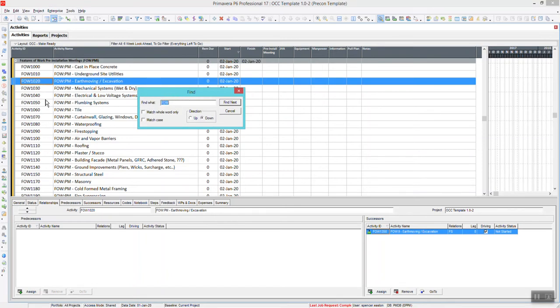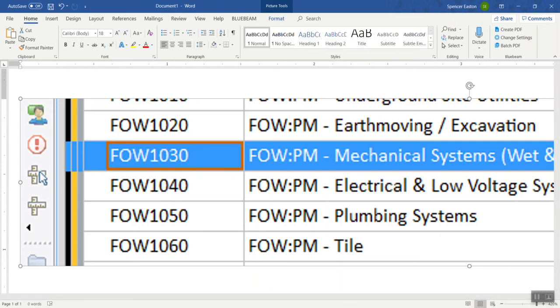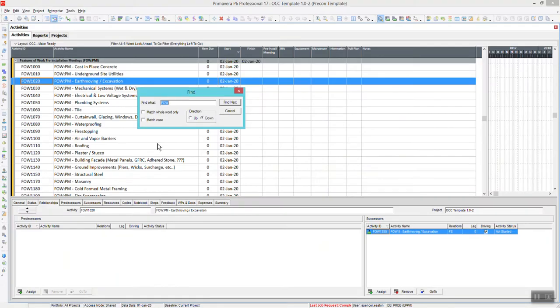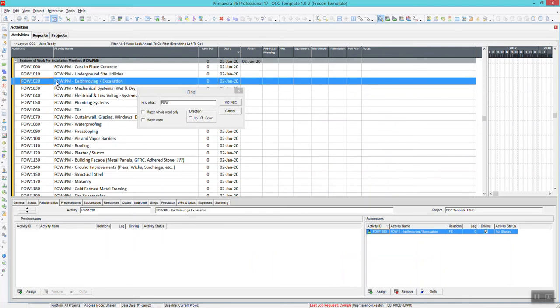One thing you have to keep track of is what cell you have highlighted. I'll blow this up to show you this dark orange box around the Activity ID here. That means that I have that cell selected in that column. When you're using the Find Function, it is searching within a column. So it's important to know where you are clicking or where you have highlighted.